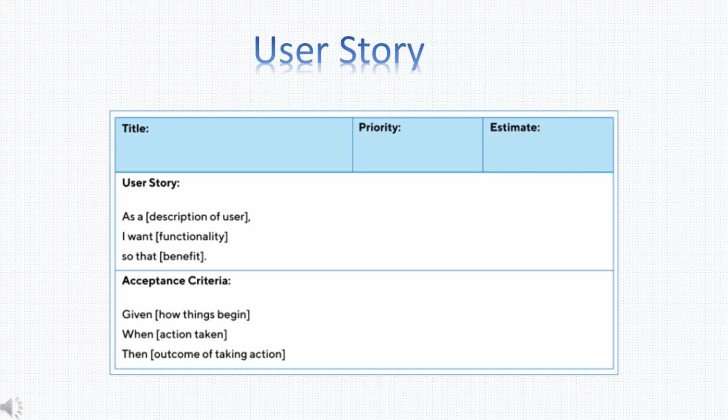User stories are typically written on index cards and arranged on walls or tables to facilitate further planning and discussion. A user story card will typically contain an item identifier, name, and description, its estimated value from the product owner's perspective, the estimated effort required from the team's perspective, any associated risk, dependencies, and acceptance tests required.